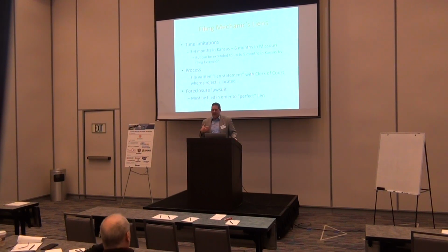Now, a lot of times somebody's going to call me and I'll say, well, when did you last do that? Well, it was this day, and we billed it this day. I'm like, well, that's too late. We're too late now. But when were you last out there? When did you have equipment on there? And I've had cases with HVAC where they had everything installed, everything was there. They just had to show up 3 months later and get it all started up, right? The judge said that was okay. So I would say you try to use the earliest day, but I'll use a different day if I have to, and try to get that done.